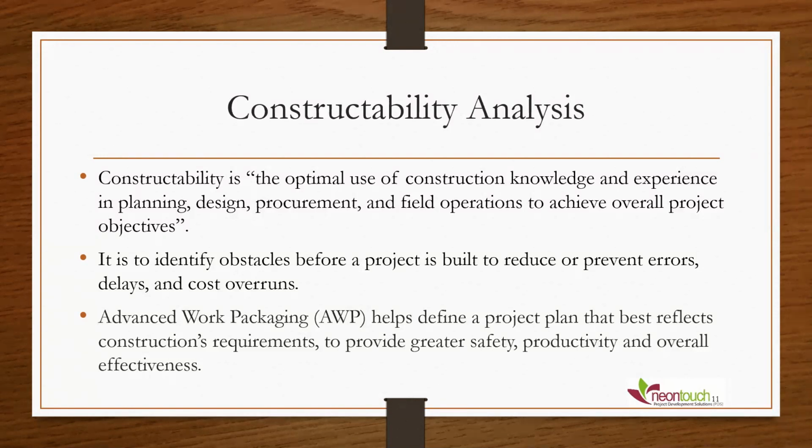Advanced work packaging helps you define a project plan that focuses on construction requirements. With advanced work packaging, you focus all of your plans, design, and procurement on how the project is going to be installed to the minutest level.